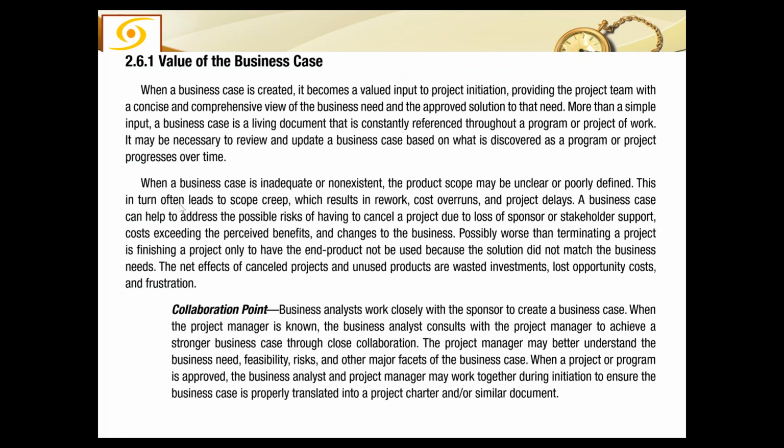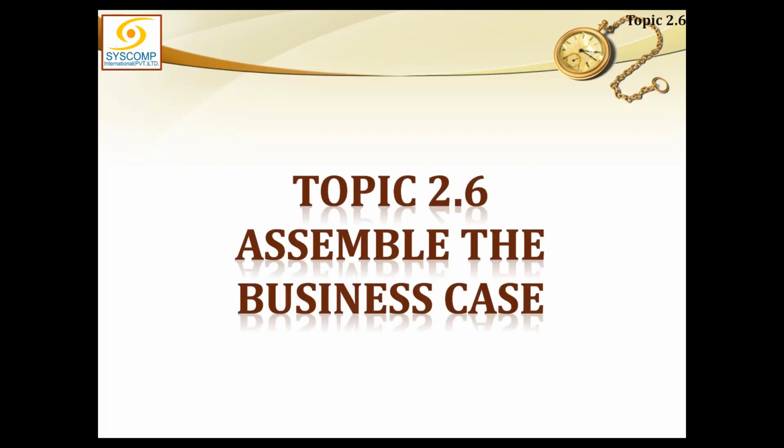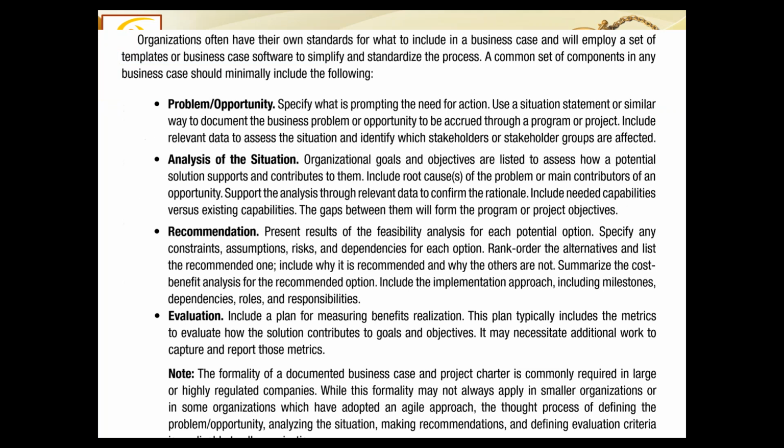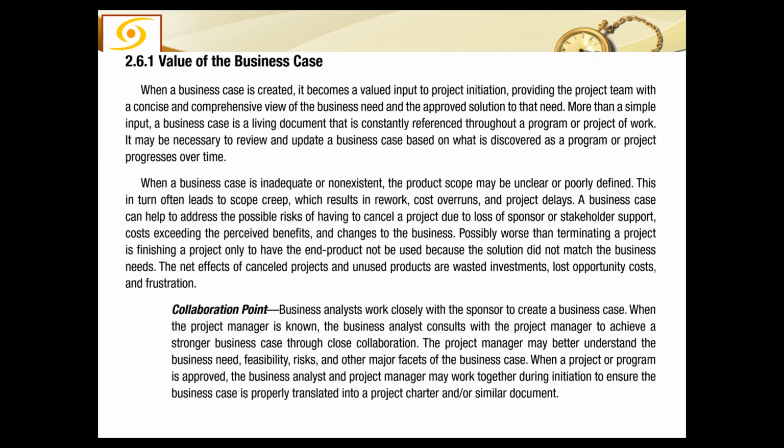A business case can help to address the possible risks of having to cancel a project due to loss of sponsor or stakeholder support, cost exceeding the perceived benefit and changes to the business. तो आप ये गौर करें, बिजनेस केस जड़ है, इसकी वजह से इतनी सारी प्रॉब्लम्स खड़ी हो सकती हैं। तो बिजनेस केस जितना अच्छा होगा उतने आपके प्रोजेक्ट के अंदर सारे काम बेहतर तरीके के साथ परफॉर्म हो सकेंगे।